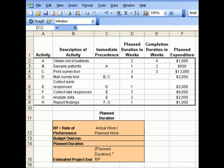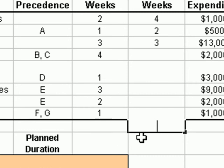Just by looking at the data given to us, we first have to determine which of the three activities A, B, and C fall under the critical path. We can see that activity A and B are in the critical path and activity C is not. To determine the actual work time, we add the number of weeks it took for activity A and B to be accomplished: 4 plus 2 equals 6.